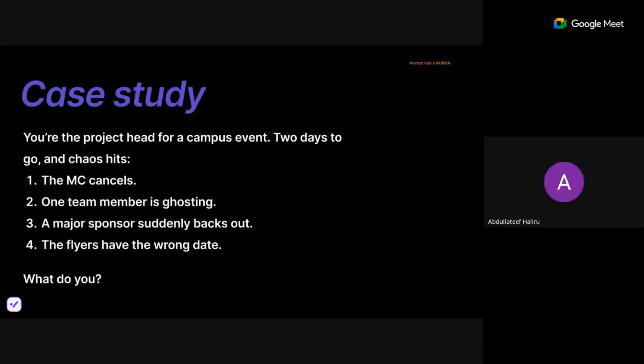Okay, thank you very much for this opportunity. So I want to start with the beginning. You said number one, we have the MC cancelled. Number two, one of the team members is ghosting, the major sponsor suddenly backed down, and the flyer has a wrong date. One of the first things to look at is that the major thing here is the money. The sponsor is already backing down, so there is no money. So as a project manager, the first thing you do is cut costs, or look for how to get another sponsor within that short period of time. If there is no way to get a sponsor, you will find a way to cut costs in major ways.